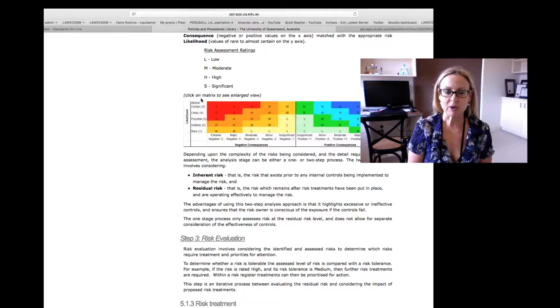This is the University of Queensland one, so they actually go ahead and map out all positive consequences of risks as well. And then they go ahead and look at, well, where are the risks that are in the red shaded area? Where are the risks that are in the yellow shaded area? And the whole process of going about evaluating really is about prioritising.